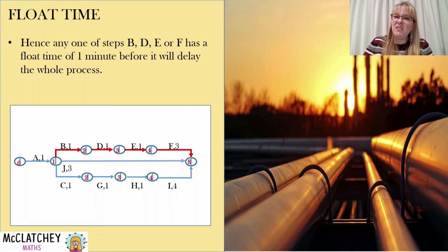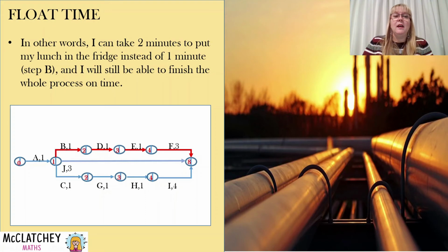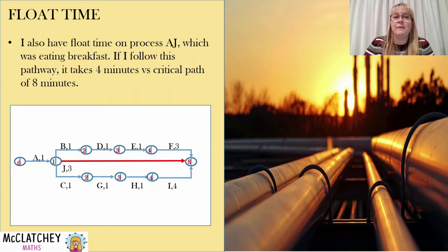I've got a minute up my sleeve, a bit of slack time. It's called float time. I could take 2 minutes to put my lunch in the fridge, which was activity B, instead of 1 minute, and I could still finish this whole process on time.